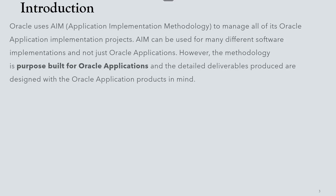Oracle AIM methodology encompasses a project management methodology with documentation templates that support the life cycle of an implementation. The life cycle methodology and documentation templates make AIM a very useful tool for managing implementation projects successfully. There is also another methodology called OUM — Oracle Unified Method — which is based on the waterfall model and the spiral model. In this video, I will focus on AIM.